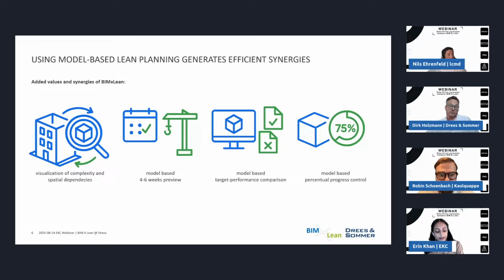I think this is a really important point, because it's not only in the preparing phase that you can say it's already 60% finished because you know all the activities which are necessary to complete this building element part. But this is not detailed enough to have detailed information about the process itself. And with this combination, BIM and Lean, it's possible to do a procedural progress control.